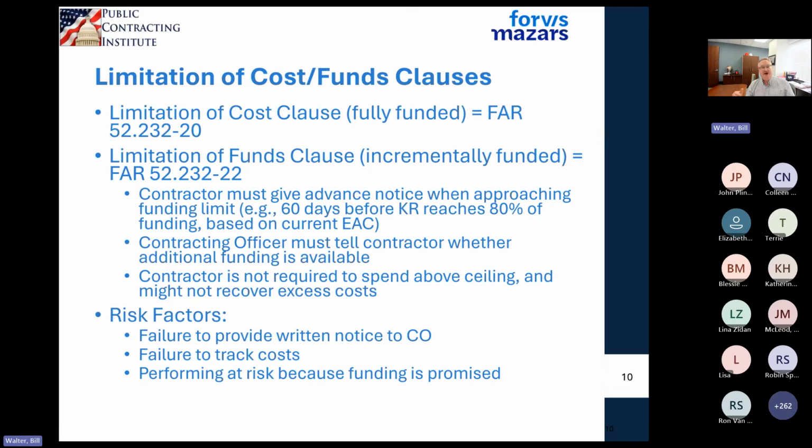You can put on your knee pads and say, hey, guys, we overspent. We'd love it if you had some additional funding that you could help us with. We've had some companies who've had success with that. We've had companies who have found no success with that. But the funding is so critical, because that is the cap on the government's obligation to pay under a cost type contract, unless you can prove changes and all sorts of other things that require a lot of legal support.